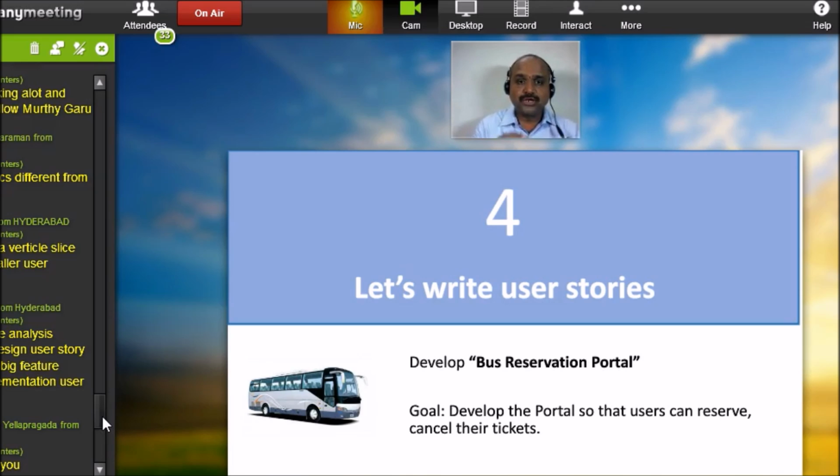And then you have another special category story called tracer bullet. The tracer bullet means you make sure that you implement bare minimum core functionality to go through the front end, middle layer and database layer. You just sense how the system is touching. So tracer bullet is like taking the way the bullet passes. Similarly, you want to make a dent into the proposed system so that you can actually experience how UI, middle layer, database, how they're interacting.